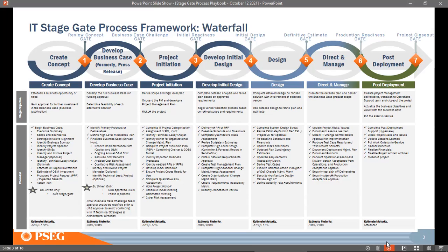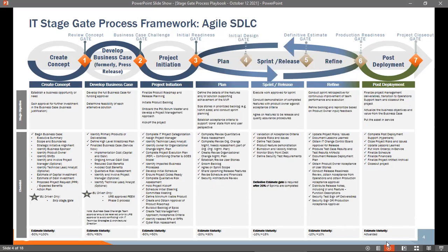The next slide shows you the Agile methodology. This is the same thing, and most of it aligns with the Agile concept. Basically the first 3 steps remain the same. Then starts a typical Agile way of approaching things, right? You plan, sprint, release, and then refine it, come back and do the next sprint. After multiple sprints, when you have enough minimum definable deliverables, you move them into production as a release. Then come back and do that until all the user stories have been addressed.